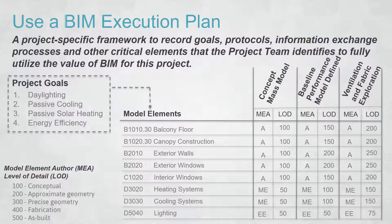Once you know your requirements, you can assign the appropriate stakeholder — the architect or engineer — who may need to further define information on windows, glazing, or lighting systems at each phase. This is where you define what needs to happen at what phase, to what level of detail. With all this information, you progress as a team so the energy modeler has the right information, provides the right feedback at the right time, and tracks and updates measures throughout the whole process.